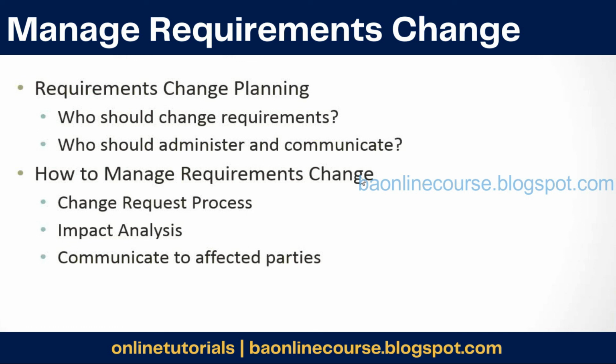So that would be the things that we would do in the first week or so of the project, right? You're not going directly and saying, okay, let's start with requirement 1. You're doing some planning. So you're creating a project plan in place. You're ensuring that there are scope management techniques identified. You'll agree on the traceability template, the change management template. All those, both the parties would agree. And once all these documents are signed off, the project plan is formally approved by the client. That is when you will get into your requirements. So till that time, it's all planning exercises. All right.